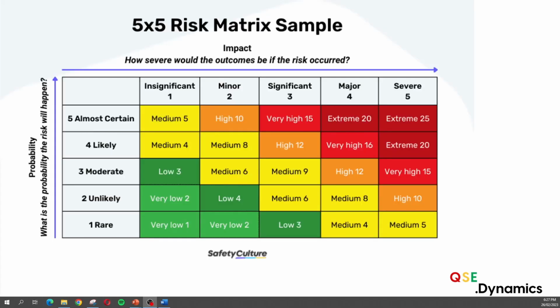The first example is your fairly typical, I would say, 5x5 risk matrix, where we have our probability and our impact. So we've called it consequence here. You'll always see a variation in the types of words used. All means the same thing in this case. And there's a few things I like about this one. So one of them is the ability to have a difference between low and very low. I like the idea of splitting up that category. I think sometimes the low category is overused a bit, and it can make you think that there's no risk associated with anything that has been deemed low.